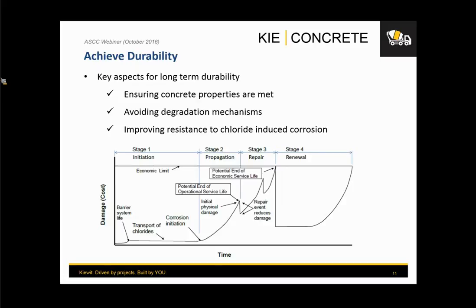And there are a lot of different approaches to this, but to achieve durability, it's a little more than just concrete, right? You need to consider a lot of it, and you need to plan ahead of time, because if you have a project that you need to start and complete in a certain time, a lot of these tests can take 3 months sometimes, and the amount of money you have to spend in consultants and testing programs is evolving, and it's getting more expensive every time with the requirements for longer durability periods.